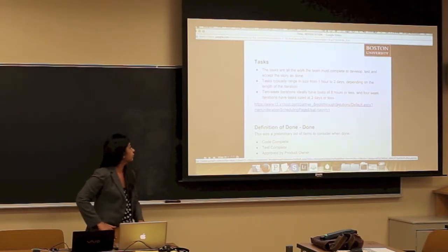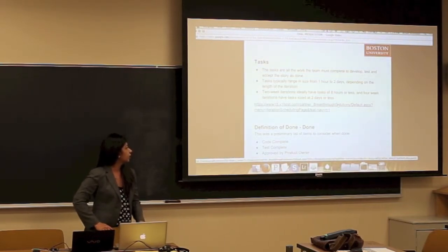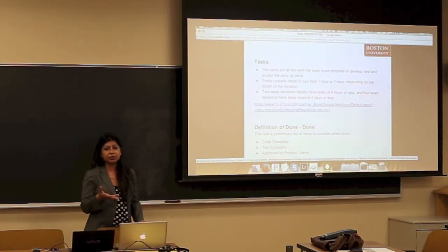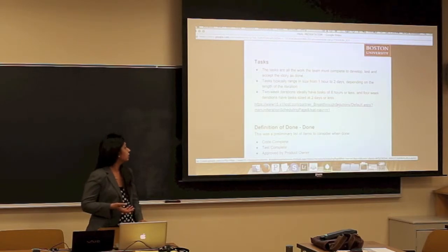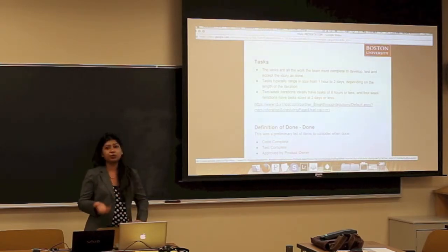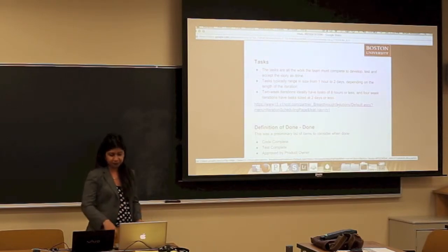So now we come to the definition of done. This was the preliminary list of items to be considered: the code was complete, the test was complete, and it was approved by the product owner, then the task was done.